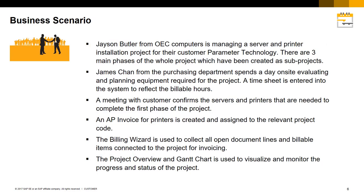Here is an example business case scenario. Jason Butler from OEC Computers is managing a server and printer installation project for their customer Parameter Technology. There are three main phases of the whole project which have been created as sub-projects. James Chan from the Purchasing Department spends a day onsite evaluating and planning equipment required for the project. A timesheet is entered into the system to reflect his billable hours. A meeting with the customer confirms the servers and printers needed to complete the first phase of the project. An AP invoice with printers is created and assigned to the relevant project code. The Billing Wizard is then used to collect all open document lines and billable items connected to the project for invoicing. The Project Overview and Gantt chart is then used to visualise and monitor the progress and status of the project.